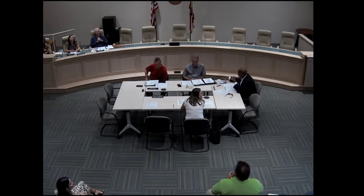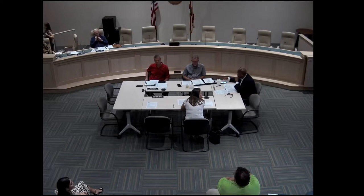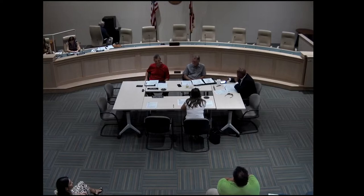It was a long lead time, as with everything else that we're trying to do right now. Every single thing we're getting is long lead time. The issue was that the controls inside that light are outdated, so everything had to be replaced. They had to rebuild everything, both sides, all the lights, with an all new computer. So it's all ordered, they've got the PO, we're waiting for it to show up, and then we'll have somebody install it as soon as we get it.